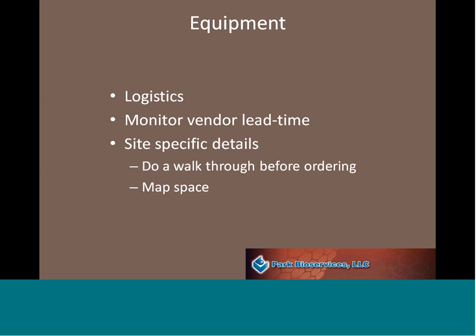The other factor is, not only do you have to order the equipment, not only does it have to be produced, not only does it have to be shipped to you, but then you also have to consider the things you need to do once you get that equipment in-house. Part of that is training the people, getting them familiar with the equipment, but then also sterilizing and then validating the equipment. All of those are very necessary steps and have to be done before the animals are introduced into the isolators.